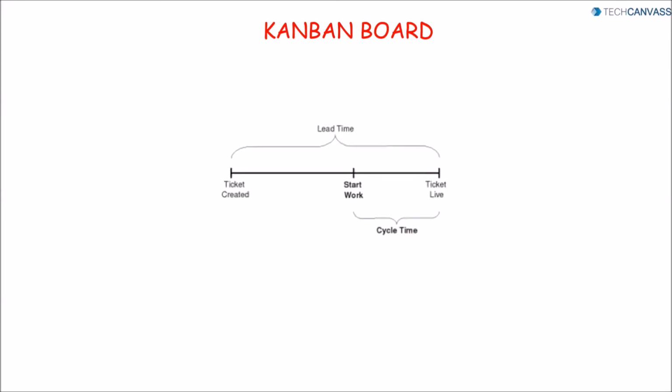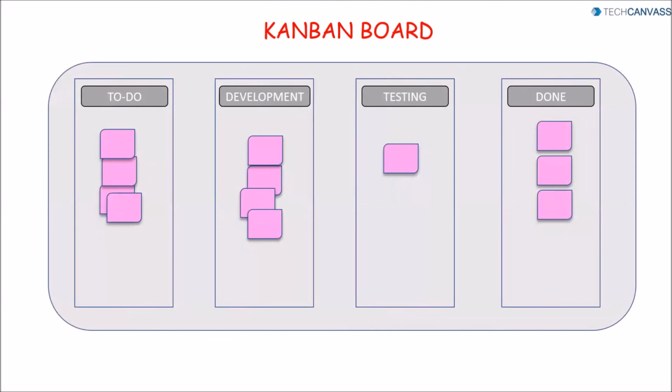The efficiency of the workflow is calculated as lead time. It is defined as the time from when the actual work for the item is started till the item is complete. Though Kanban is an agile model, the development is not bound by iterations. The team picks up the work item from the backlog and works on it following the flow. The Kanban practice gives a good visual to see the status of your items. The best part is it can be applied at all levels, be it at delivery level or at strategy level or any kind of management level.